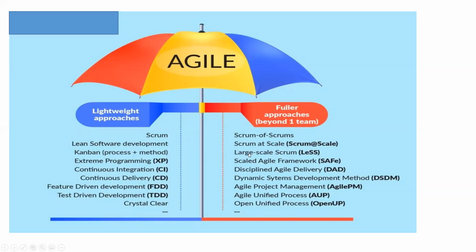So in terms of enterprise scaling, Scrum of Scrums is when you have, like I've said, 10 or 12 squads working together on the same project. We call them Scrum of Scrums, where they are working on the same feature. So you have to be collaborating on the dependencies or planning your work to make sure that team A is delivering what team B will work on. So these are high-level Agile scaling.